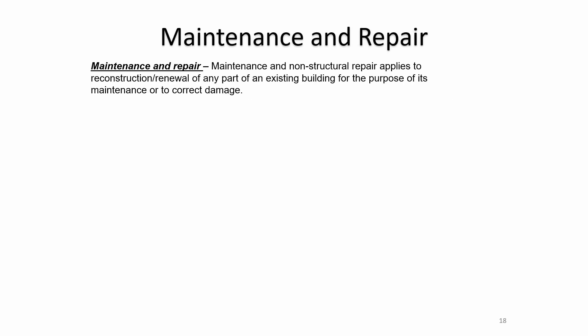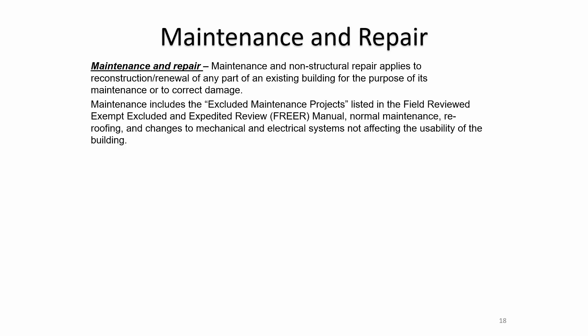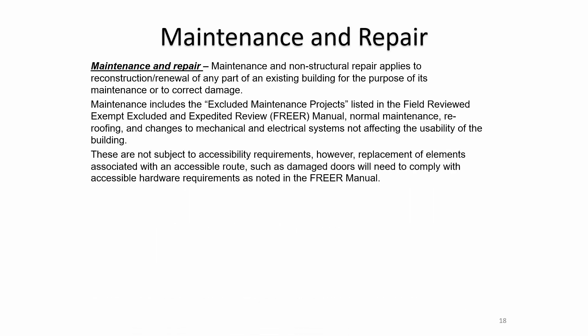Moving on to maintenance and repair. Maintenance and non-structural repair applies to reconstruction or renewal of any part of an existing building for the purpose of maintenance or to correct damage. Maintenance includes excluded maintenance projects listed in the field review manual — normal maintenance, re-roofing, and changes to mechanical/electrical systems not affecting the usability of the building. These are not subject to accessibility requirements. However, replacement of elements associated with the accessible route, such as damaged doors, will need to comply with accessible hardware requirements.